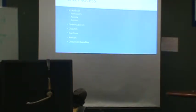All right, you want to update your dispatch notes. Okay, so the second note you're going to create in your call management tool is a dispatch note. Okay, the dispatch note, you've got to make sure you outline your scope of work, what tools are required, what escalation contacts they have, and what their deliverables are. So you've got to make sure you clearly outline to them. They're only going to know what you tell them, right, in that documentation, okay? So it's very important that you outline any deliverables you need, any requirements you need, anything you're expecting for them to do, make sure it's outlined right there in your dispatch note.